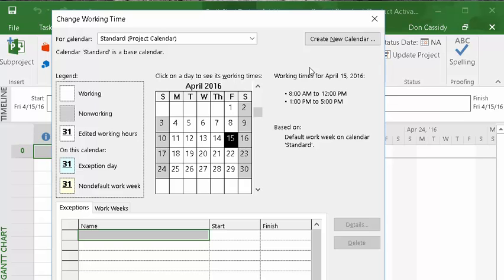With this project that I'm going over here, it's actually a basement addition, and there's going to be standard hours that apply, but also some non-standard hours from this calendar for the basement addition. The homeowner is going to work on this project on Saturdays. Part of it's going to be done by contractors, but part of it is going to be done on Saturdays. So really, we need to change this. I need to change this calendar. So that's what I'm going to do. Bear with me here while I walk you through it.